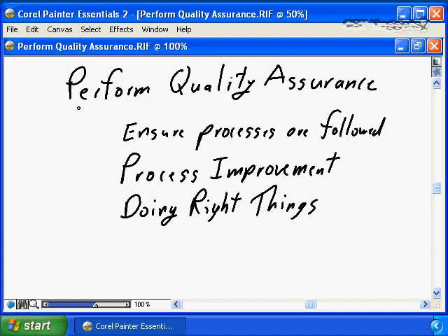One of the most critical components of project executing from a project management viewpoint is quality assurance. Whether you directly are responsible for quality assurance, i.e. in addition to the project manager's hat, you're also wearing the quality manager hat, and that's not uncommon for smaller projects. In small projects, it's very common that the project manager is also the quality manager. As projects get larger and more complex, we will often bring in a separate manager directly responsible for quality. It doesn't matter from a project execution viewpoint whether you are wearing the quality manager's hat or whether you have a separate quality manager reporting to you.